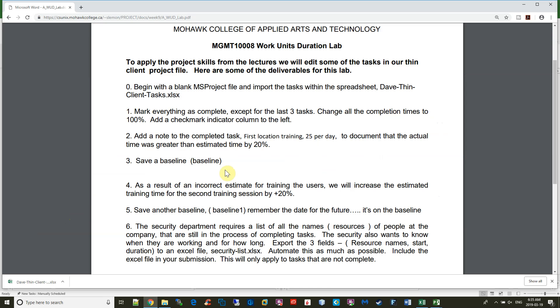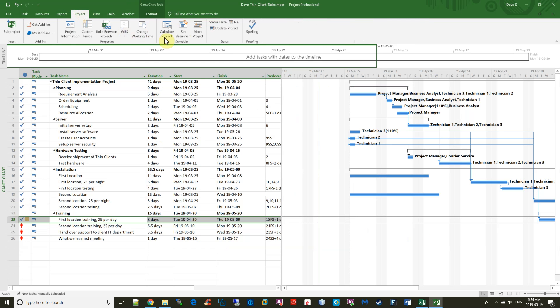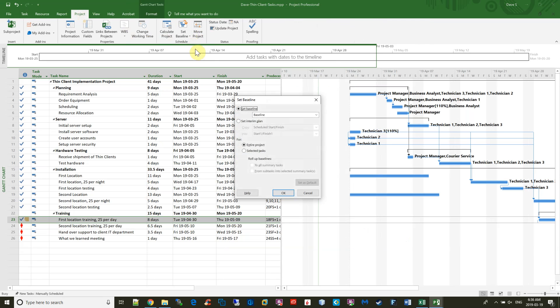Next is number three, save a baseline. Okay, to do that, I'm going to go to Project, Set Baseline, Set Baseline. The entire project's fine, and say OK.